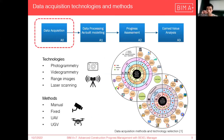These are the sub-processes of the workflow, starting with the data acquisition methods and technologies. Progress data can be obtained through photogrammetry, videogrammetry, range images or laser scanning, and the methods to do so can be manual or through drones. It is also important to mention that the selection of these technologies and methods depends on the type of project and its characteristics, checking each time which is most suitable.